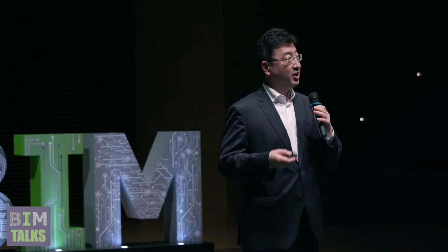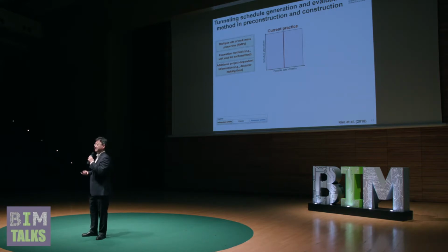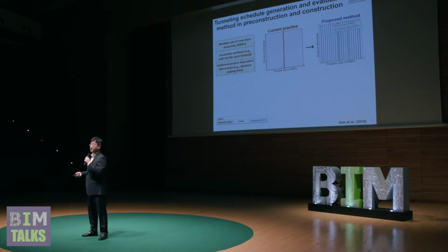So to overcome this limitation, I developed a tunneling schedule generation and evaluation method applicable to pre-construction and construction. First, in current practice, practitioners usually consider, as I mentioned, only one scenario of ground conditions, but this method can consider multiple possible scenarios of ground conditions.